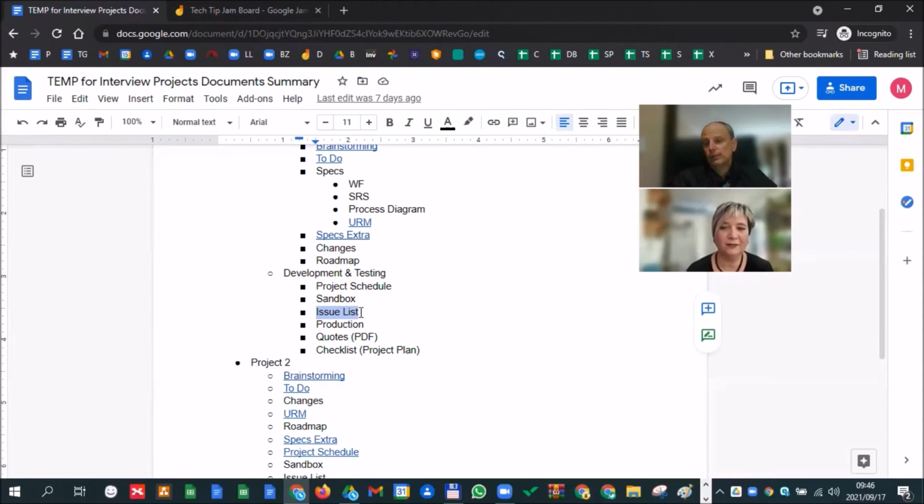And it's also very important to be disciplined. Every single thing, if it's a small cosmetic issue or a major bug, it needs to go onto the list, be prioritized, be assigned, etc. And obviously this issue list must be resolved before we go over to the next phase, which is deploying to production. So this is the final website that the general public can access.